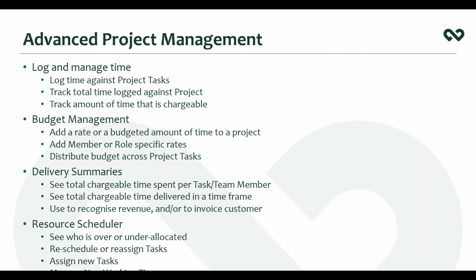And we've added a resource scheduler so that now that you've got tasks in there and they're signed out to people and they've got estimated efforts, well, you can see who's been allocated work, who's over allocated, who's free to pick up new things, and work around holidays or sick time or other leave in order to manage those tasks and make sure that you're going to be on plan.